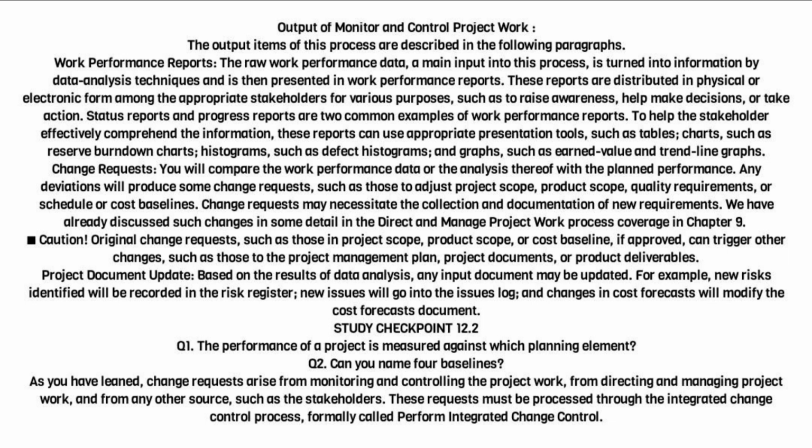Project document update. Based on the results of data analysis, any input document may be updated. For example, new risks identified will be recorded in the risk register, new issues will go into the issues log, and changes in cost forecasts will modify the cost forecasts document.